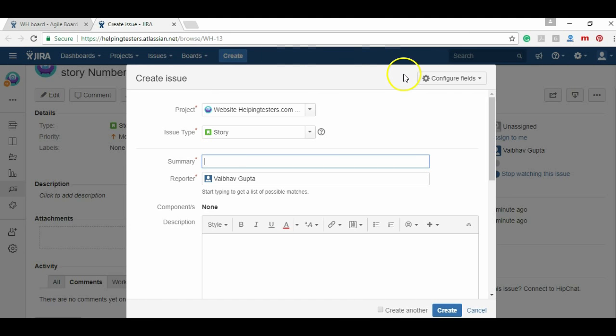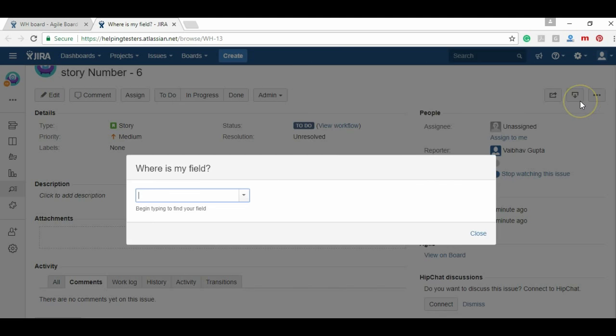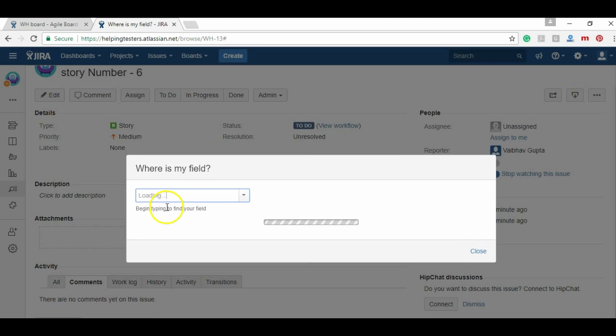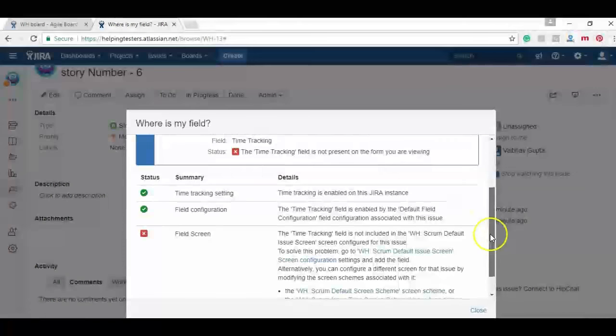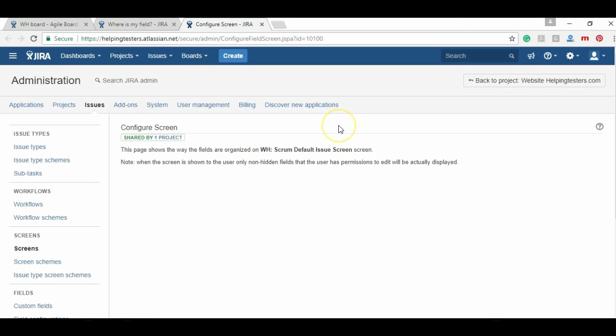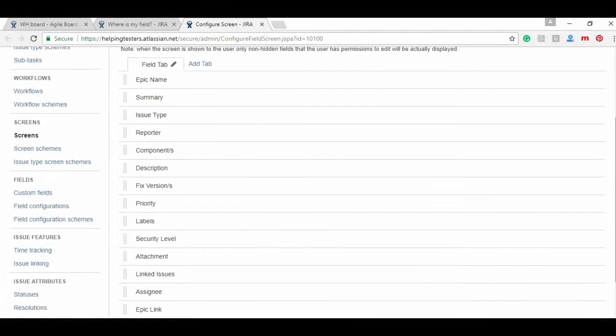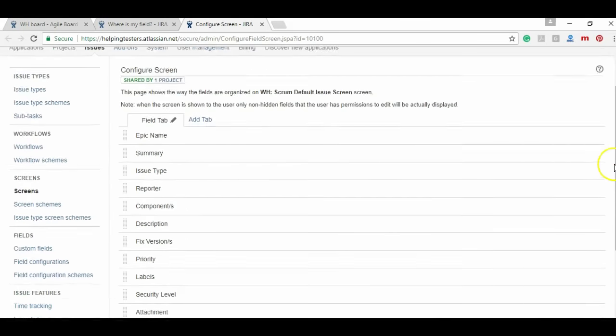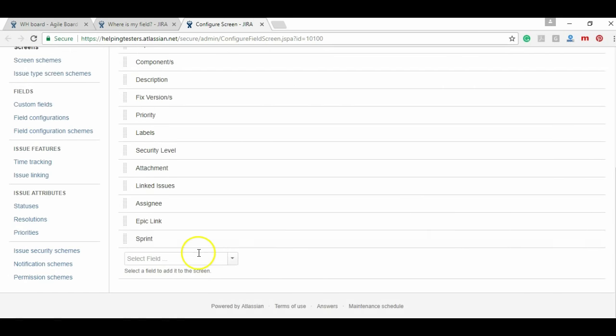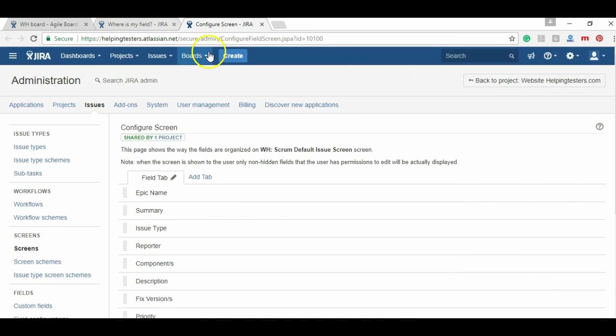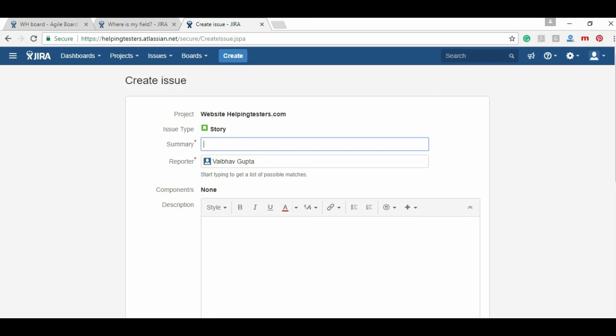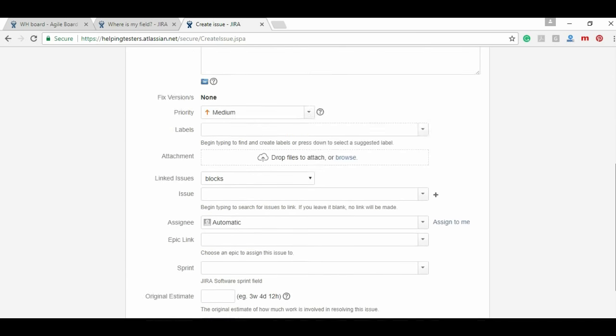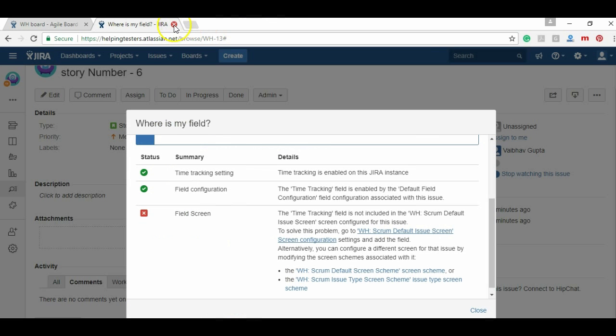Go to configure fields. I want to have this field time tracking. Let the Jira decide why it is not showing. It's saying three needs to be done, two are fulfilled, and we need to add it. Just go to that link and scroll down. The reason is that our screen is not configured to show this field. So because no time tracking is mentioned, do time tracking here, and let's do create now. I want to create a story. And if I scroll down, yes, it's giving me time to estimate my task. So it's done.